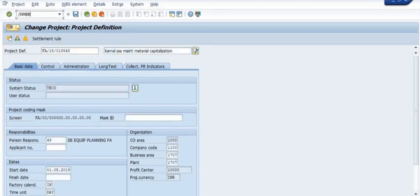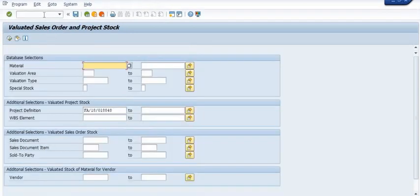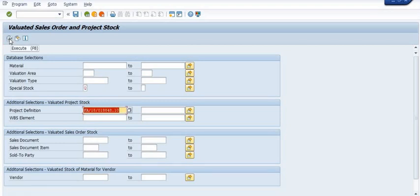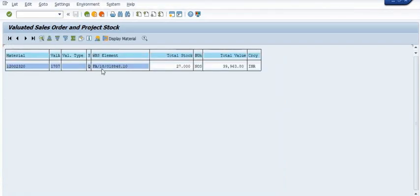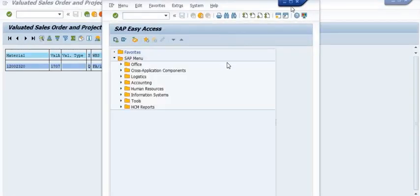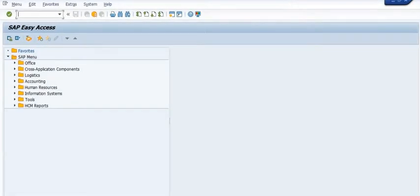To check which stock exists, we use transaction code MBBS. Fill in the WBS element in the field. MBBS is the transaction code where you can see that 27 units of the material quantity are pending in this WBS.